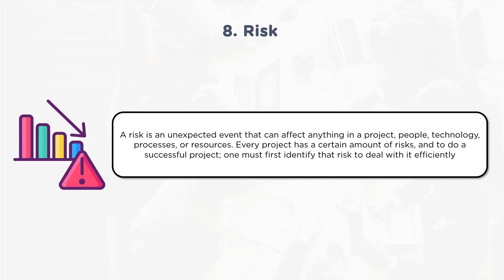So risk identification, analysis and assessment of that risk has to be done throughout the life cycle of a project. The reason being, a risk which looks like a high impact when the project is initiated will vary in impact levels as the project progresses. Maybe in the middle of the project, the impact may be very high or low. Likewise, the impacts of the risk will vary throughout the project life cycle. It may be positive, it may be negative. So as with identifying the stakeholders throughout the project life cycle, as I said, that is also dynamic. I cannot just have a list of stakeholders and keep it as it is. I need to update that also regularly.